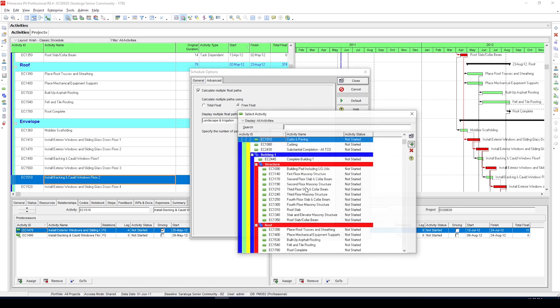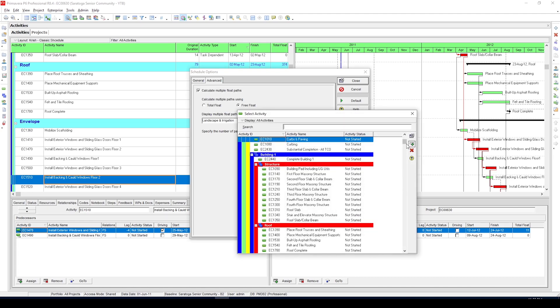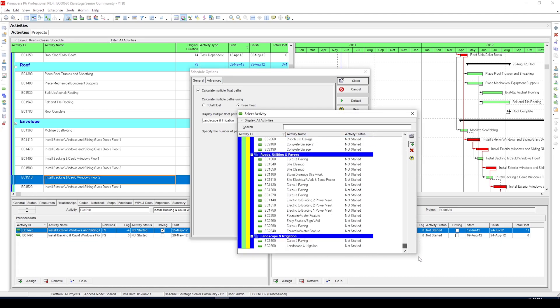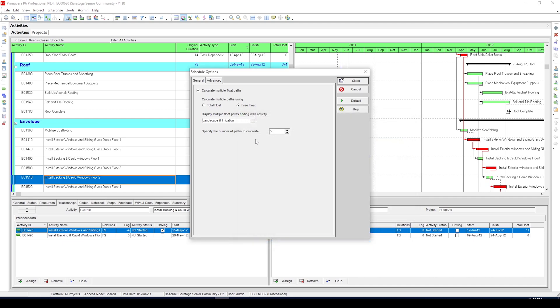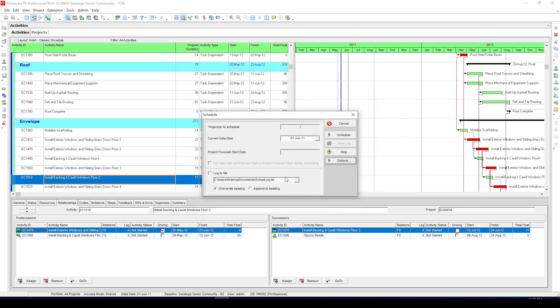Then select the final activity in your project schedule and finally enter the number of float paths you want to calculate. Five is usually enough so we'll leave it to that. Close this dialog box and click schedule.